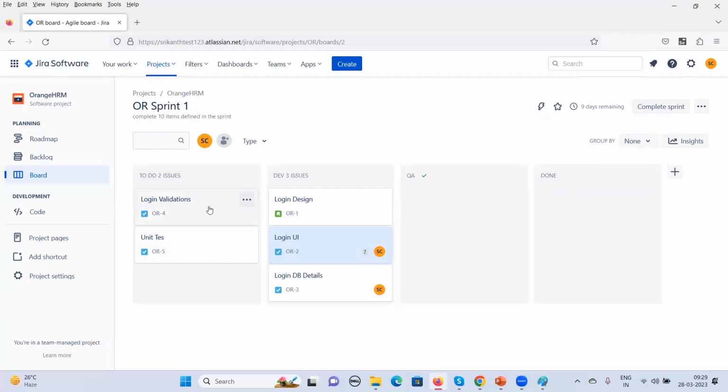So we'll be managing this Scrum board, the Scrum Master. Who has to work on these items? Team members. Who will be giving these product backlog items as sprint backlog items? This will be done during the sprint planning meeting, and the sprint planning meeting will involve the product owner, Scrum Master, and the whole team. So all these things will be done as part of the Scrum framework.